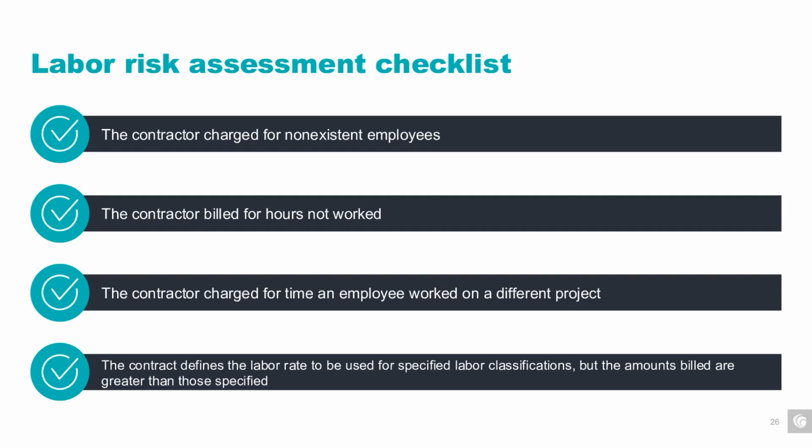All right, so let's talk about some common risks we often see in labor billings. One risk is that the contractors charge for employees who are not working on the project, or in some cases, employees who don't even exist. Another risk is billing for hours not actually worked. A frequent issue we come across is contractors invoicing for more hours than what's recorded on an employee's timesheet.